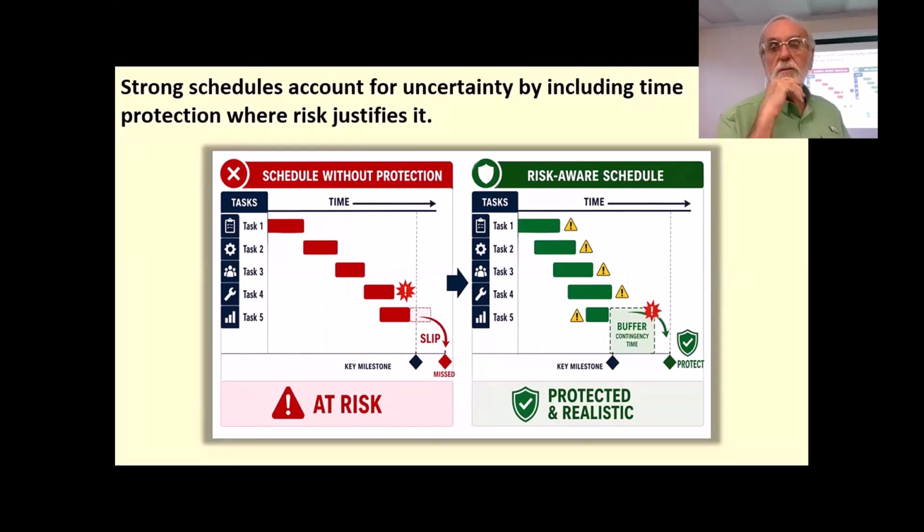If you back up from that, which is a useful way to schedule, by the way, to start with your milestone and then back up from it, back then it took roughly 35 days for a ship to leave China, make it across to Long Beach, and get unloaded.